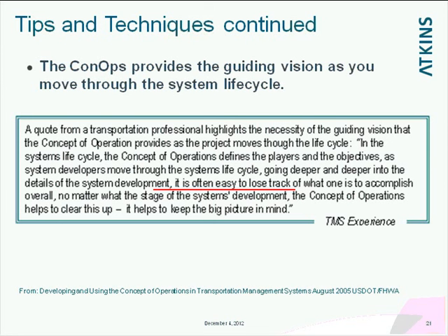I've got a project here in the United States that is a transportation management system project that started 7 years ago with a concept of operations, and we're finally getting a vendor on board now who's building it. And it helps to go back and read the original ConOps to see what it is that we originally wanted to do. And then it has been revised over the years to adjust, but it's still a pretty good document and keeps everybody focused on where we're going.